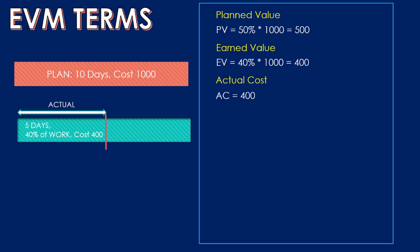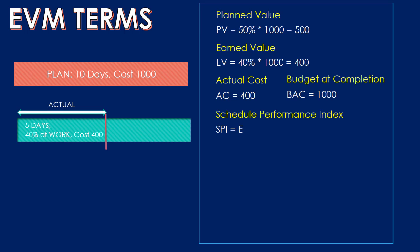The Actual Cost (AC) is straightforward — it has cost us 400 so far. The Budget at Completion (BAC) is simply the total planned cost of the project, which is 1000. Now let's define some indices that measure how efficient we are. The first is the Schedule Performance Index (SPI), which is the ratio of earned value to planned value. It measures our schedule efficiency — how well we are performing according to the planned schedule, not cost.